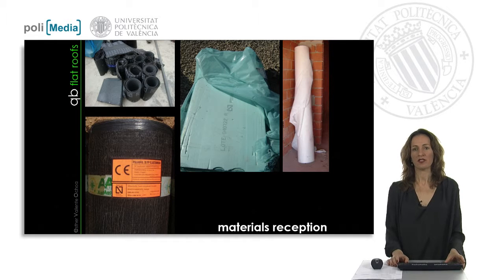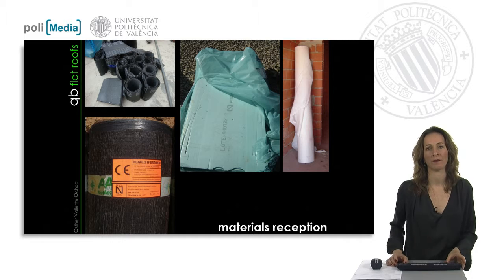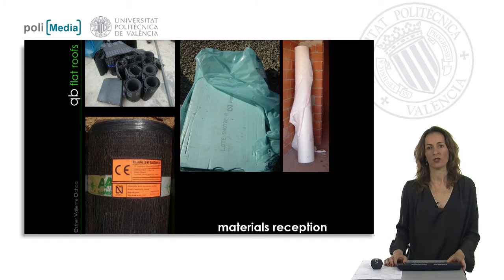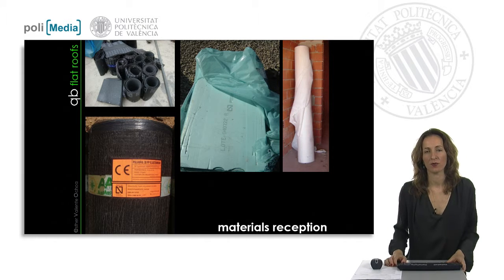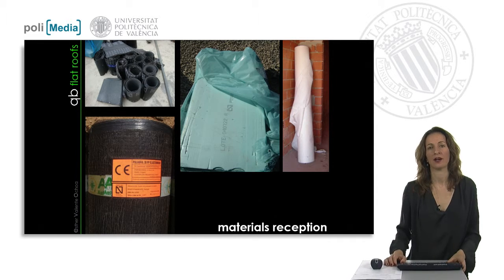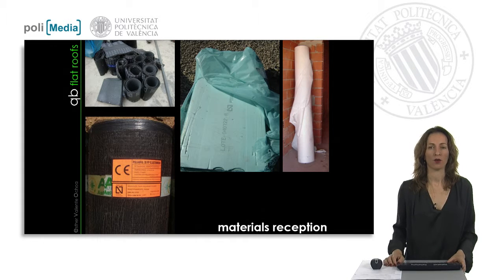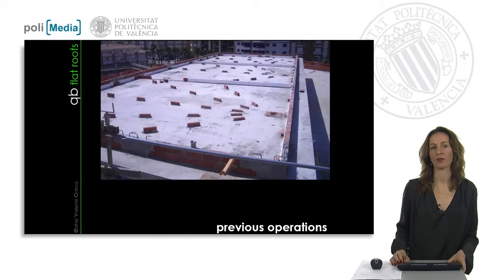The materials reception should find and respond to all the requirements that are mandatory for construction materials. Notified bodies are responsible for certifying whether the materials follow the mandatory specifications from the CE mark and the current directive on construction products.